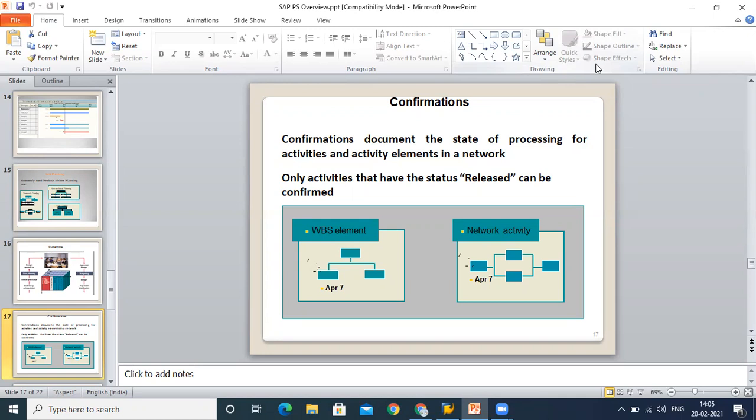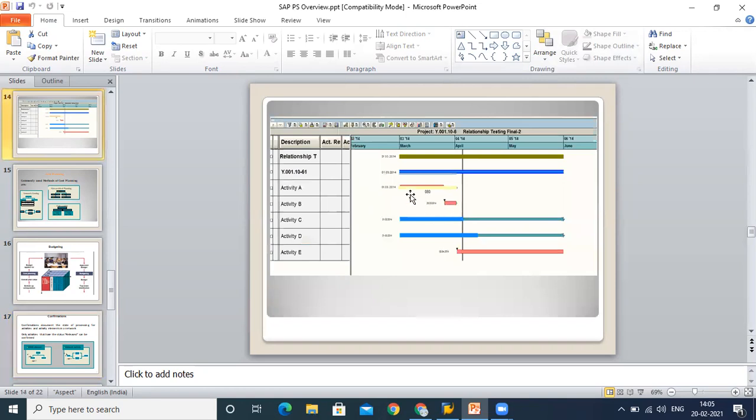At the time of confirmation, we need to enter the actual start date of the activity, the end date, and the progress. Let's say start date is yesterday, end date is today, and I say my 50 percent work is over—I can mention this detail in confirmation. Based on this confirmation, we have one yellow line. In the previous lecture, I told you this yellow line is your actual work, so this yellow line gets updated based on our confirmation. Not only planning, but for monitoring purposes, confirmation has become an essential part.